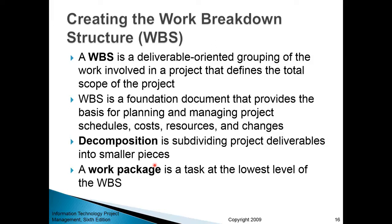Some items into which you decompose your scope statement may not be actionable. For example, let's say you have a project to improve organizational performance. Under that, you have two subtasks: minimizing cost structure and improving customer satisfaction. But those two items are not work packages — you cannot act upon them. So you need to break them down even further until you have something specific and actionable.